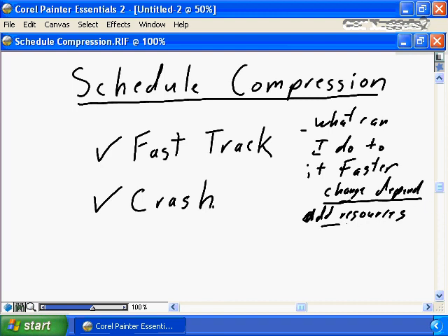Adding resources does not always improve the project delivery situation. Sometimes adding resources will actually change the end date in an unfavorable direction because of the extra interaction and extra dependencies. So the techniques for fast tracking, changing dependencies, adding lead times, and adding resources may be an effective way to do schedule compression, but don't always result in success. Crashing: what can you do to change the environment?